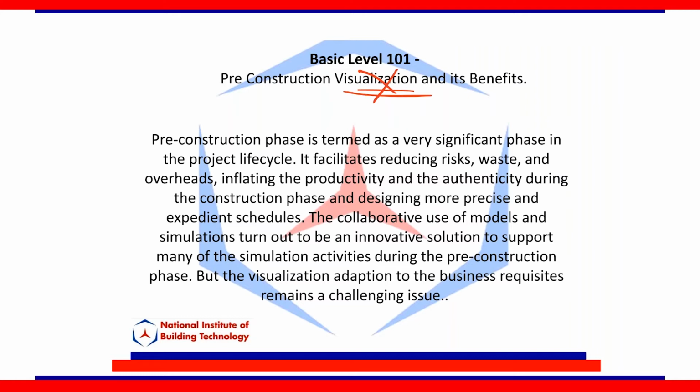Okay, and it's becoming a huge deal because a lot of general contractors, or almost all of them, at least in the United States, are offering these pre-construction services as a separate package, right? The client will hire these pre-construction services, they'll design the project, they'll make sure it's more cost efficient, the buildings are designed properly, in conjunction with designers, architects, engineers, contractors, and put everyone together, and they'll just do a pre-construction service package. Once the pre-construction service package is complete, which means the drawings are done, now it's time to go and build, then they'll go back out and rehire a contractor.